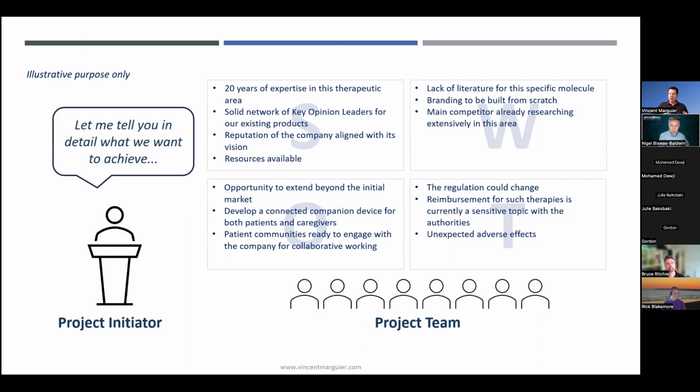In the meantime, ask the project team members to identify the statements that could qualify as strength, weakness, opportunity, or threats in their own individual way. There is no right and wrong answer, since every team member will perceive things differently based on his or her expertise. This part here should take maximum 20 minutes. Then take about 40 minutes to reconcile. That's where the project manager leads and facilitates the discussion with the team.